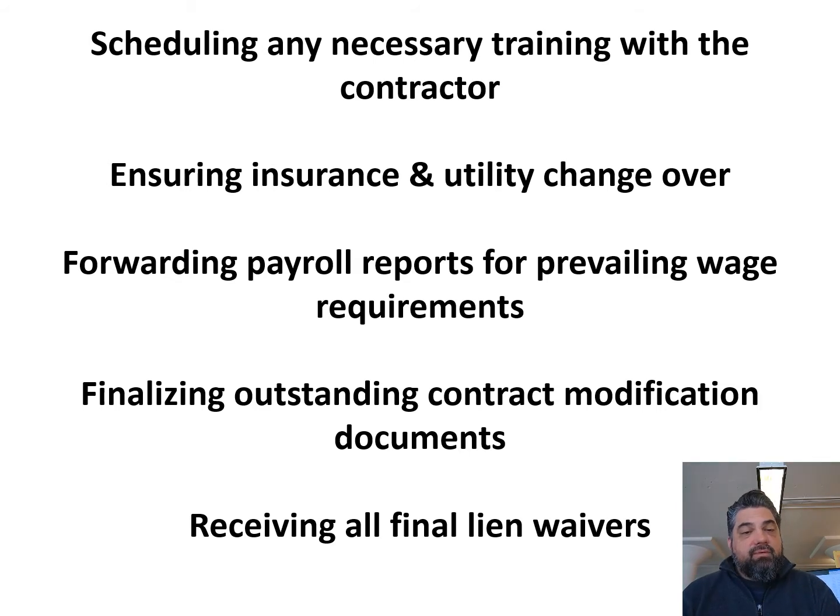On public jobs, you'll be making sure that you are forwarding the payroll reports from the contractor to the owner regarding their documentation on prevailing wage, and making sure that they meet the wage requirements that are set forth. That varies: not only are the laws governing prevailing wage different state by state, but additionally the wage that's charged for that is different county by county. So it gets even more granular than that.